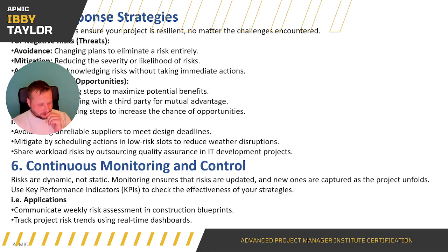So a few applications. Avoid using unreliable suppliers to meet design deadlines. Perfect if you know that someone has had issues in the past. Again, talking about lessons learned. What's happened in the past? Can we use examples from the past to ensure that we are exposed to the lowest amount of risk possible? If we've had issues with certain suppliers, let's use different ones.